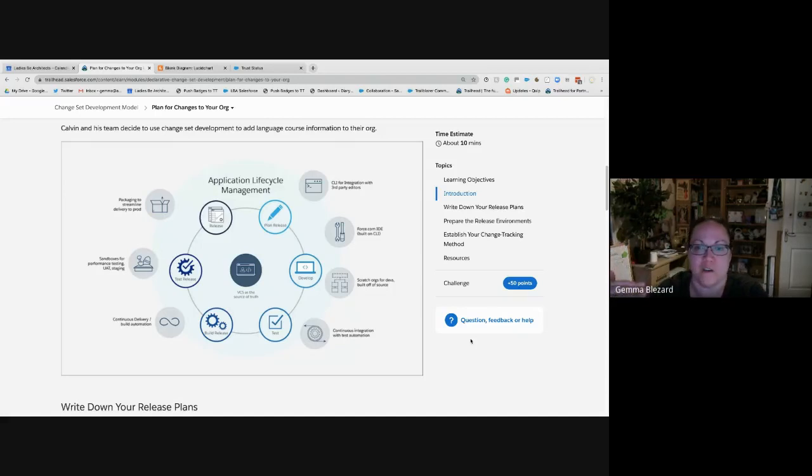So from that one sentence, you've broken it down into a tree of different tasks that you split up, and they go into your release plan. And we call that your backlog. Your backlog is based on a user scenario. It is broken down into lower level stories.